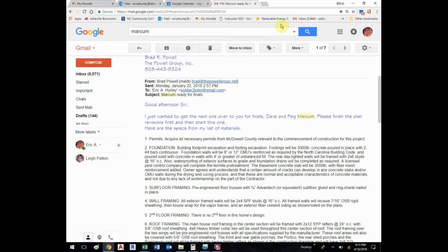Okay, guys, so this is some of the information that might be on this letter of intent. You're going to say that I'm going to build this house. In so many words, you're going to say it more like a lawyer. But you're going to be real specific about stuff so that if it ever comes back up, you have this in writing. Permits. Acquire all necessary permits from McDowell County relevant to the commencement of the construction of this project. Foundation. Building footprint excavation and footing excavation. Footings will be 3,000 pound, and that's PSI, concrete poured in place with 2 number 4 rebars.